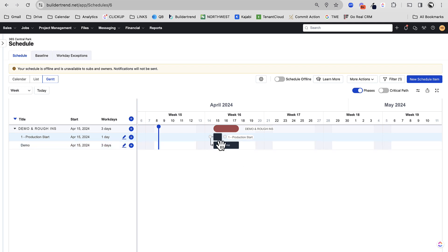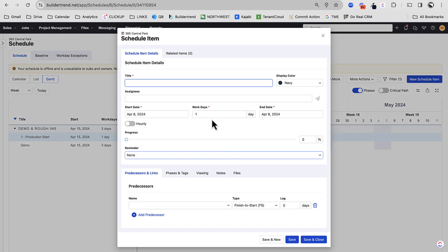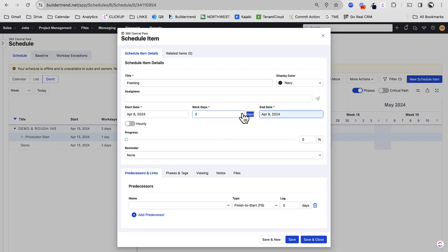And then we're going to have items that are dependent on demo, items that are dependent on those items, et cetera, et cetera. This makes it really dynamic. If anybody's ever scheduled on a whiteboard, you know the pain of creating the schedule and all these dependencies, and then something changes. You have to erase the whole thing. And that can happen within seconds. And so we don't want that to happen at all.